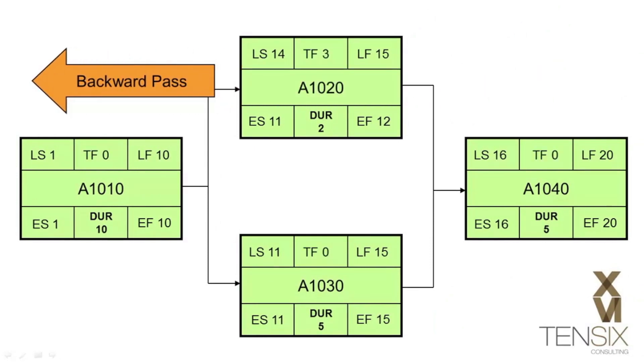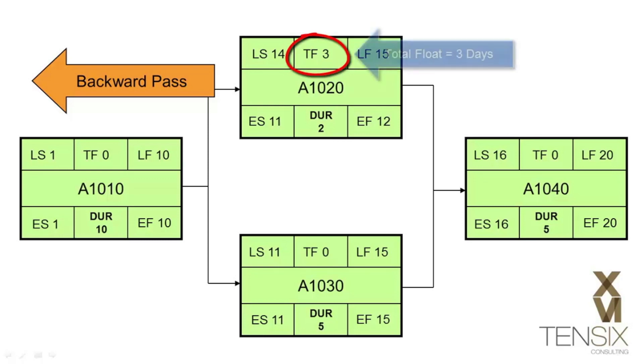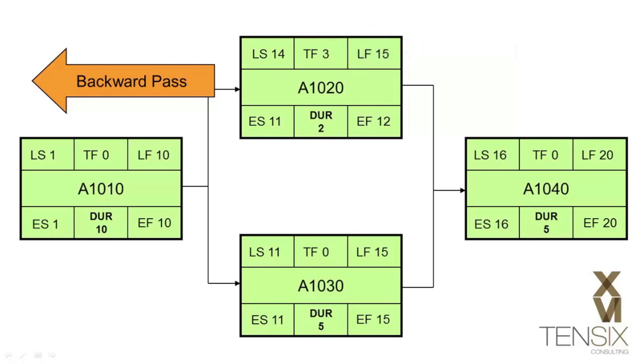What we've learned from this forward and backward pass is that activity A1020 can start as early as day 11, or as late as day 14, without impacting its successor. That is to say, the float is the delta between the early and late dates for an activity. Activity A1020 has three days' float between its early and late dates. In other words, it can slip its start date by as many as three days before it impacts its successor.